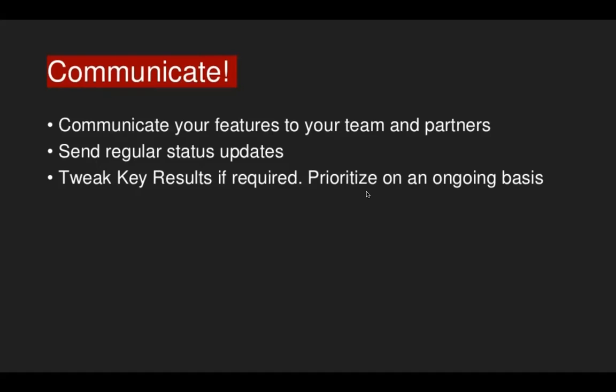You should have an internal report for you and your core team, but every 2 weeks you would want to get a report out. So in the month you have 2 reports, so that at the end of a quarter you have at least 6 or more reports, and a general report for the quarter.